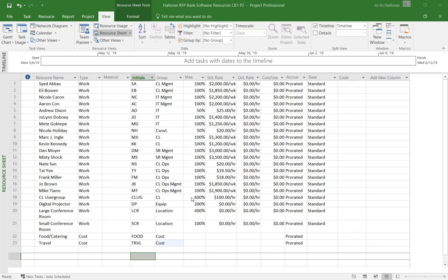So that's why when you're assigning that work group, you're going to get those 6 people. Now, that work group costs $100 an hour. That is for the 6 people, okay? And you're going to be seeing how that comes into play later on in some of the projects going forward, okay?